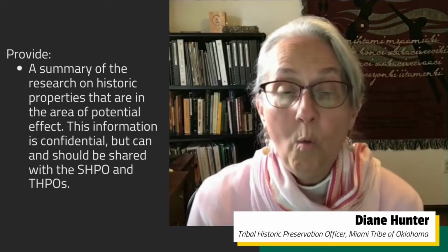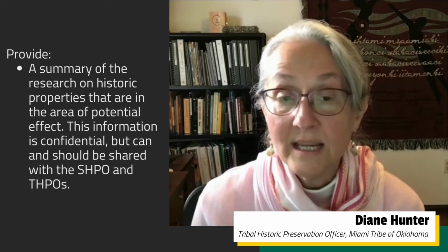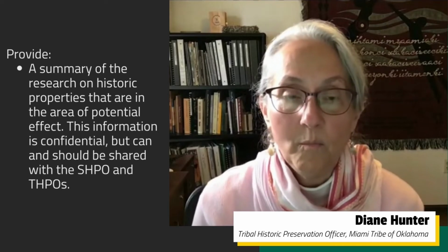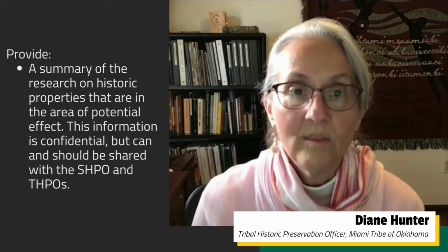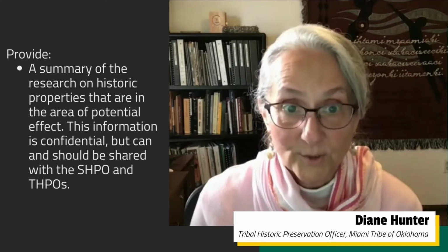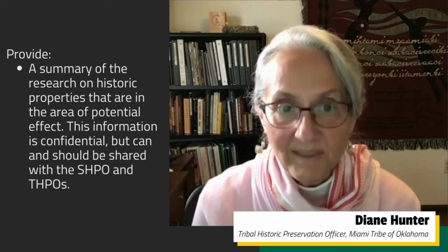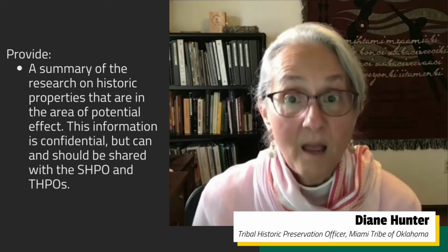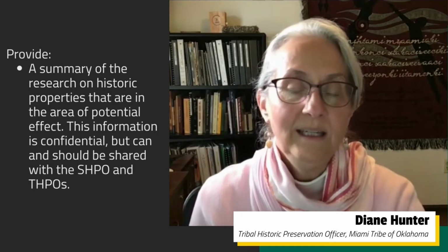I need to know what they have found out in terms of what archaeology has already been done at the site, what has been found, and they can share that with me as tribal historic preservation officer. They can't share it with other consulting parties who are not tribes, but they can share it with us, and they need to be sharing that information with us up front. Because once I have that information, then I can know what needs to happen next.